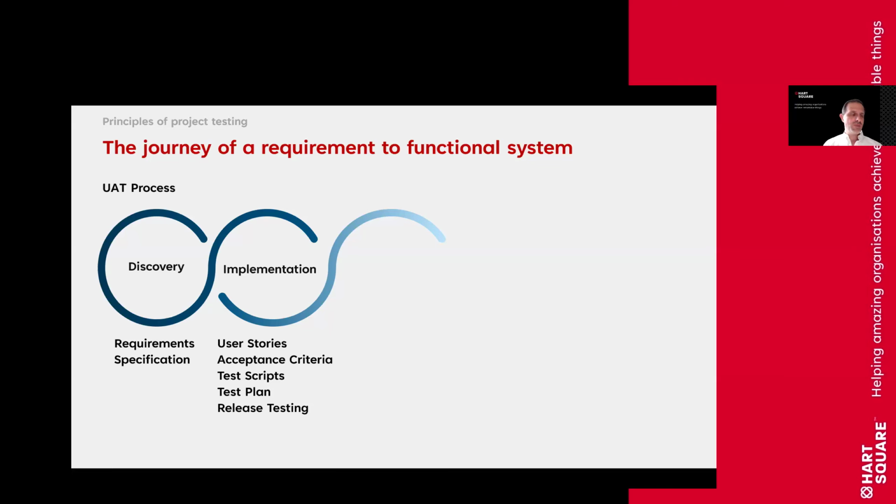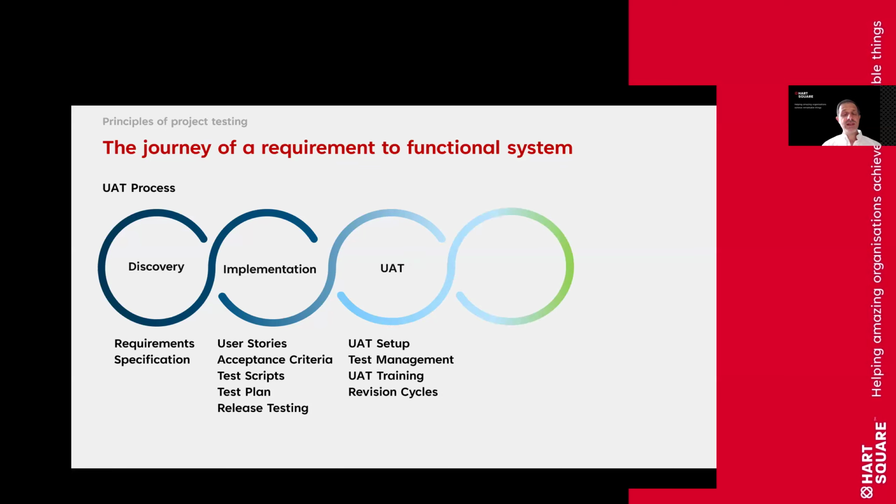So if your technology partner and the agreed plan is to do release testing, then if they're doing 4 or 5 or 7 or 8 sprints, then for each sprint you should do some degree of testing, feed that back to the technology partner so that they can address those. Agile projects absolutely need to include release testing. Waterfall projects typically don't unless they're being implemented in a more iterative fashion. But I'm a big fan of doing release testing because, again, it helps break the back of things before you get to UAT. When you get to UAT, obviously your UAT needs to be set up.